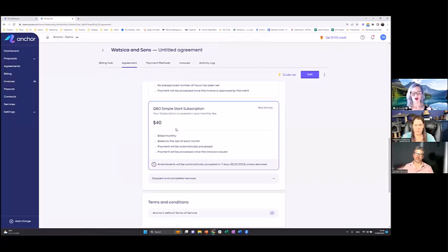Okay, so I'm going to stop and start asking some questions. One of the questions that was asked is about change orders. So that's exactly what you're showing right here, is that if somebody needs to change something, here we've got the change order. We're putting in that there's been a request, and then they have 7 days to decline it or to ask for edits. Otherwise, like you said, it's approved.